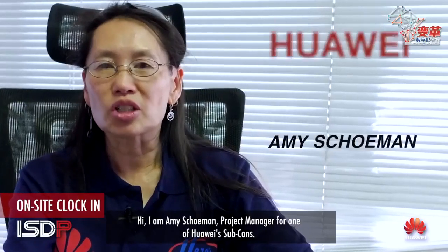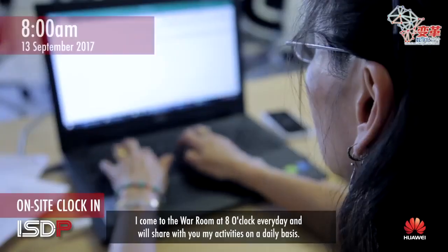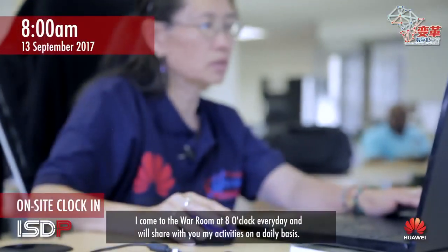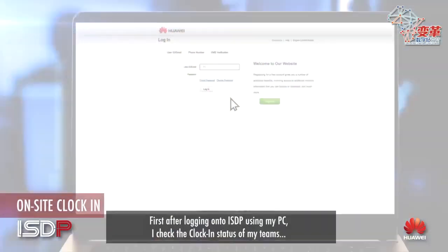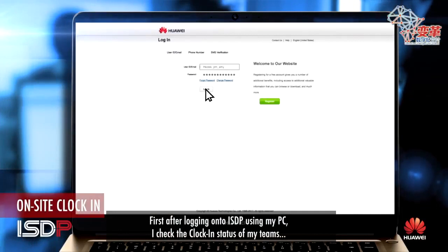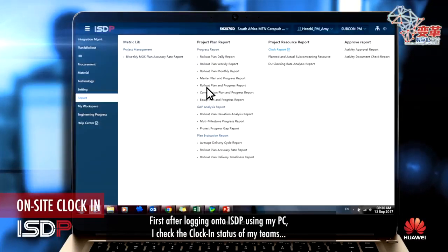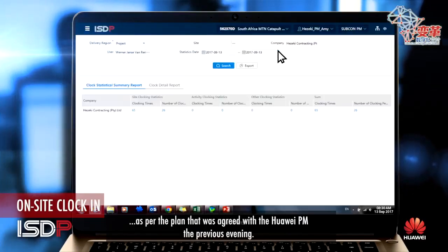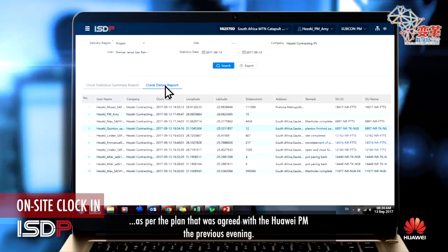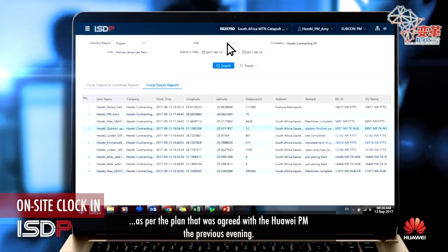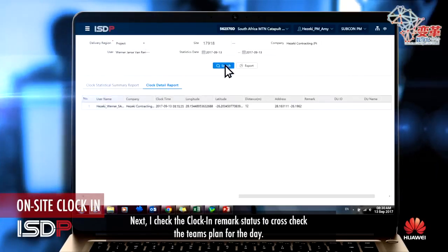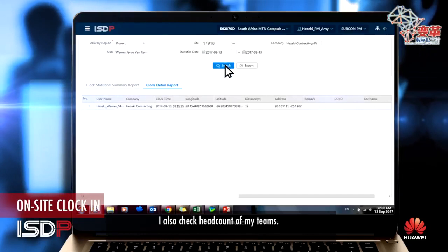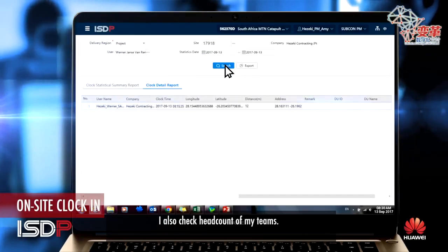Hi, I am Amy Skuman, project manager for one of Huawei's subcons. I come to the war room at 8 o'clock every day and will share with you my activities on a daily basis. First, after logging onto ISDP using my PC, I check the clock-in status of my teams as per the plan that was agreed with the Huawei PM the previous evening. Next, I check the clock-in remark status to cross-check the team's plan for the day. I also check head count of my teams.